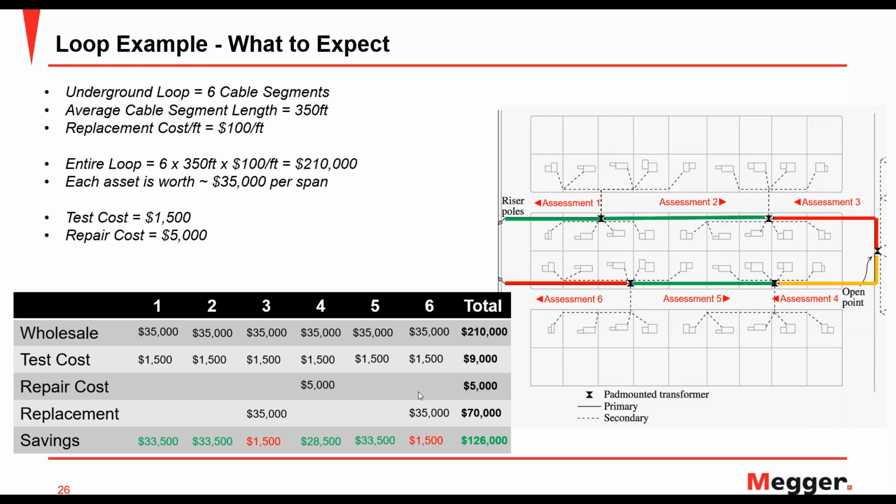Resource utilization. If a utility can bore in just a certain amount of cable per day, then in this particular case, in the proactive solution, you're only boring in 2 cables versus 6. So we're saving time with crew days and crew costs. We've got the investment return there, $14 for every dollar invested. But the main thing that's going to happen here is, because we've got the same result, a defect-free cable system, we're going to improve the reliability of the whole system.